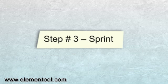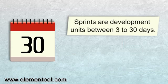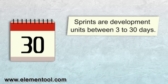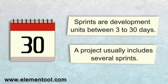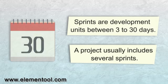Step 3 is Sprint. Here is when most of the work is being done. Sprints are development units between 3 to 30 days. A project usually includes several sprints.